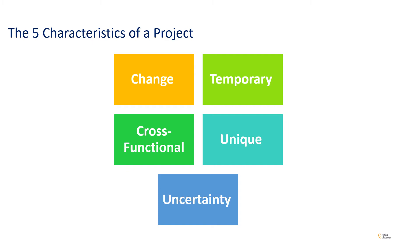The five characteristics of a project are: First, Change — PRINCE2 sees every project as a pathway to change. If a task introduces noticeable change within your organization, it is likely a project. Second, Temporary — every project has a clearly defined lifespan, from the business case approval through to delivering the product or result. Maintenance and minor updates are not part of the project. Third, Cross-functional — more than one person or department will be affected, so it's important to pull together a cross-functional team.